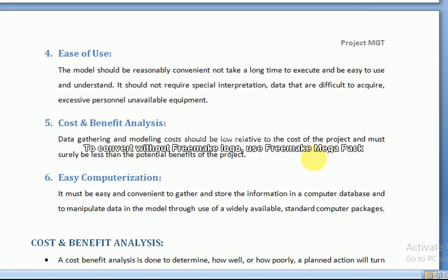So if we do the same nature of projects in the upcoming future, then in advance when we make planning, this data will help the project manager in the resource allocation, in the cost and budget analysis, and similarly for the predictions.